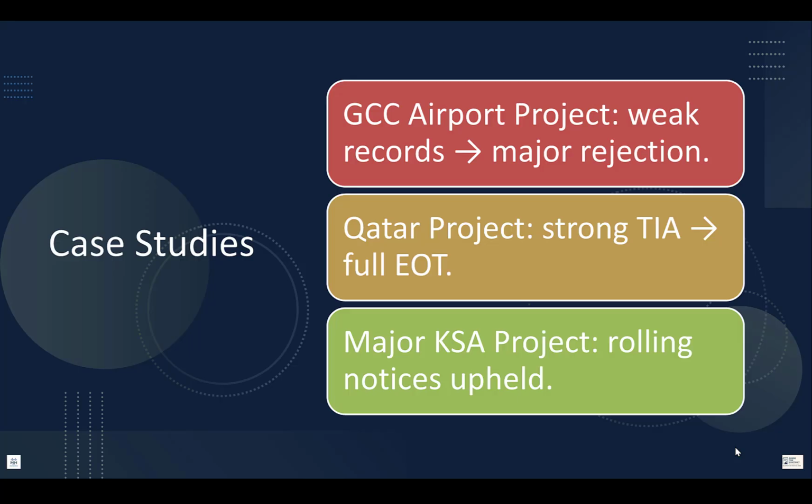Another project here in KSA. The employer repeatedly delayed interface handover. The contractor issued roll-in notices every 14 days. The engineer accepted the validity of the notices and granted substantial EOT. Lesson: roll-in notices are essential for continuous delay events.